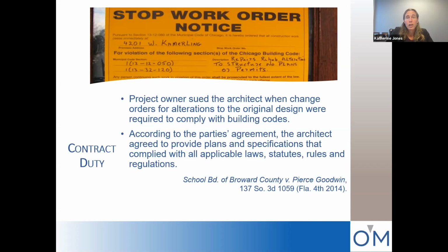You agreed to comply with all laws and rules and regulations, and you also agreed that those laws and rules and regulations would be interpreted by Broward County. Based on that language in the contract, the school board ended up winning its case, and Pierce Goodwin had to pay the school board a bunch of money to construct the staircase.